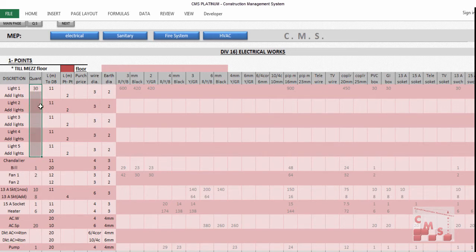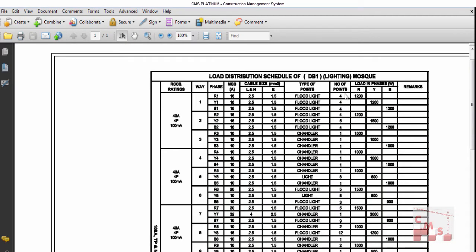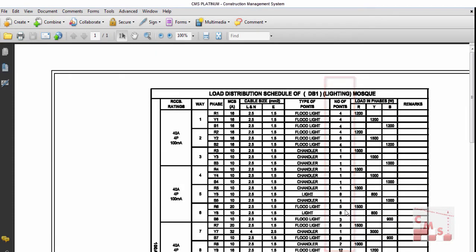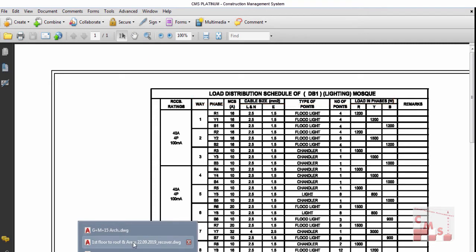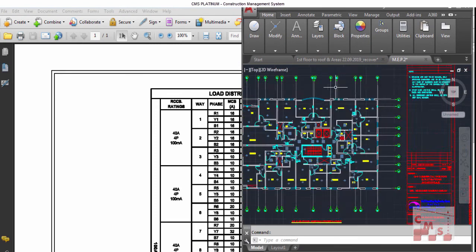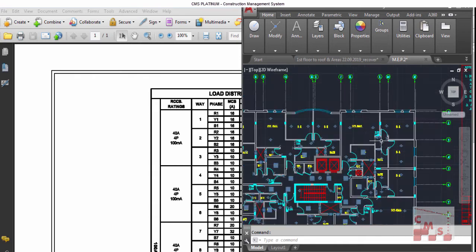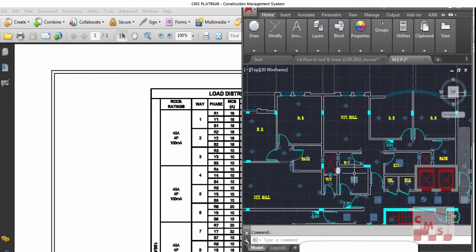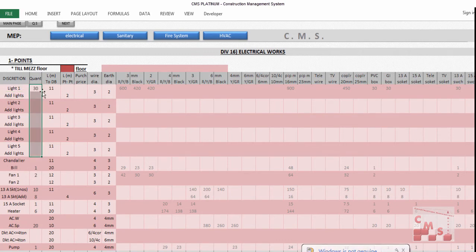You'll insert the quantity of lights here. You have two options: either use the load schedule and count the number of lights mentioned in the schedules — the schedule is available for each DB, so you calculate the light numbers from each DB's load schedule — or count the lights directly from the drawings, counting each type separately. You then insert the light quantities according to each type.